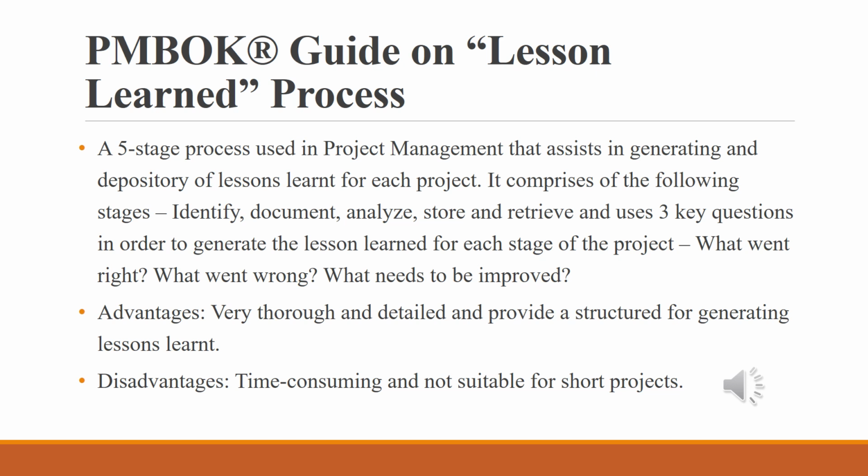It basically uses 3 key questions to generate the lessons learned for each stage of the project. The 3 questions are, what went wrong, what went right, and what needs to be improved. The advantage of the PMBOK approach is that it's very thorough and detailed, and it provides a very proper structure for generating lessons learned. However, the problem is that it can be very time consuming and not suitable for short projects like ours.